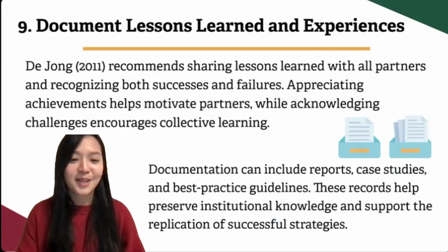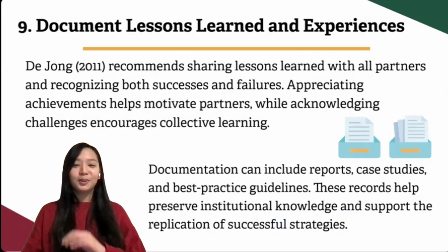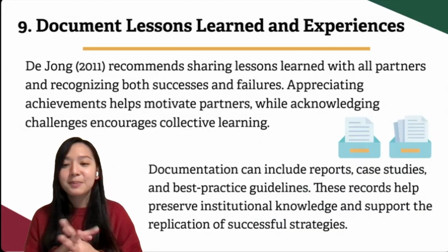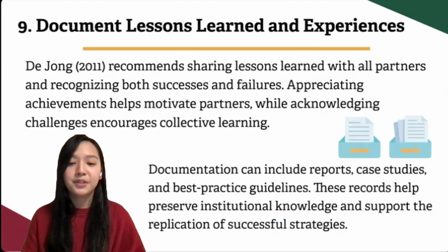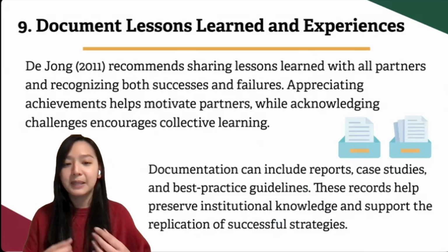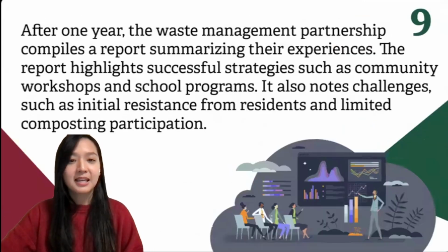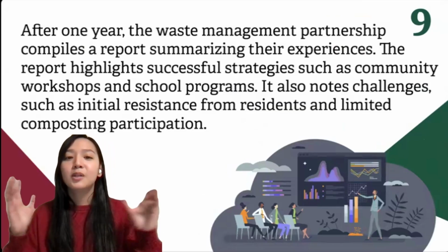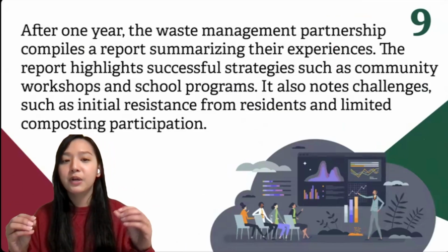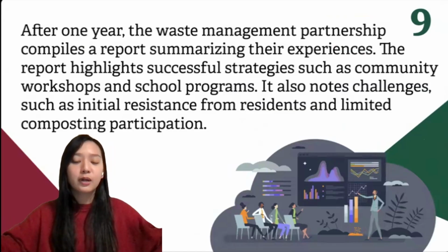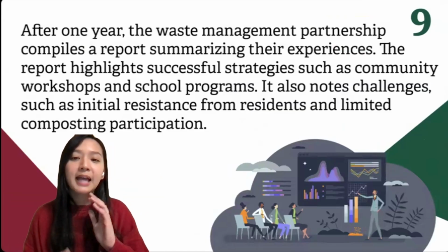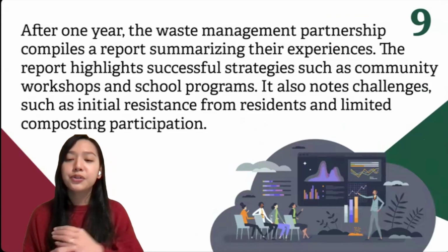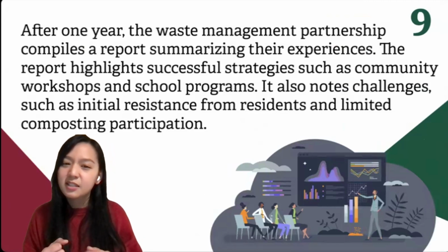Yeah, that's another step. But okay, so according to documentation can include reports, case studies, and best practice guidelines. So these records help preserve institutional knowledge and support the replication of successful strategies. So again, continuing with our example, after 1 year, the Waste Management Partnership compiles a report summarizing their experiences. So there's the record, so there's the paper. The report highlights successful strategies such as community workshops and school programs. It also notes challenges such as initial resistance from residents.